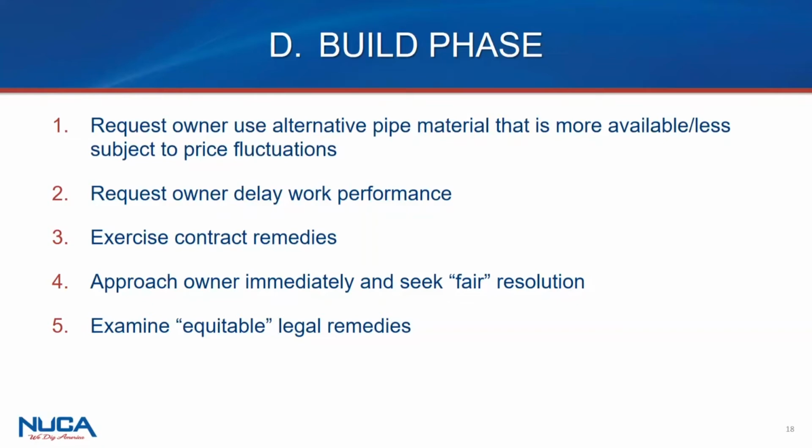I noted when I was reading through this Texas DOT memo that was just issued last month, one of the recommendations it had, in fact, the last one was, if none of the above options are possible, price increases can be referred to TxDOT administration for further consideration. Which is to say, even on a DOT level, they're recognizing that even if we don't have an obligation to pay for dollars related to this problem, that's not to say that we won't.